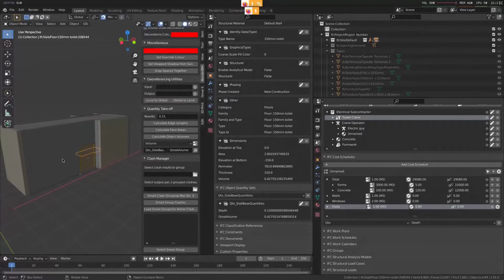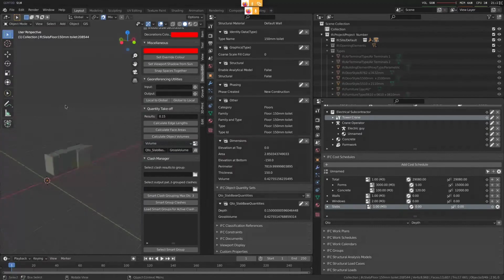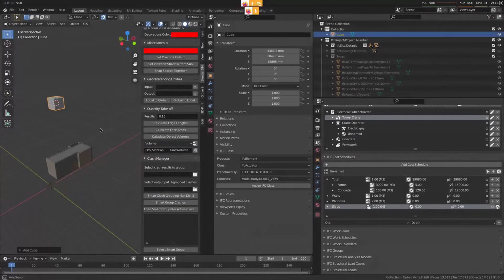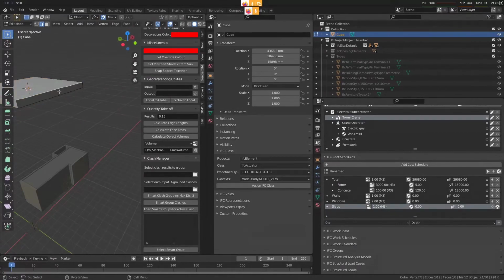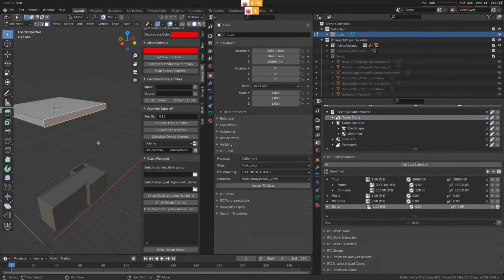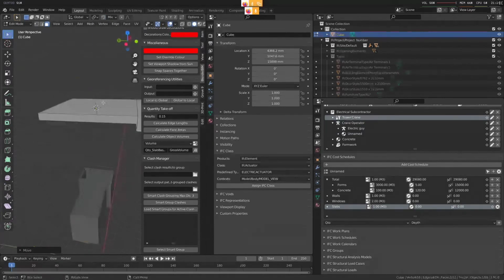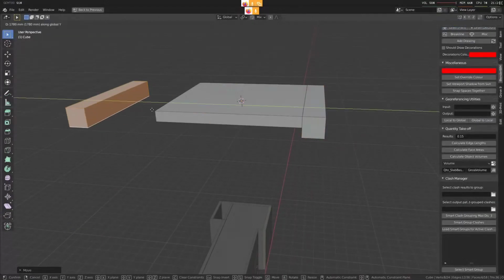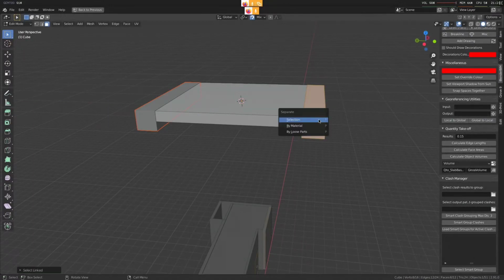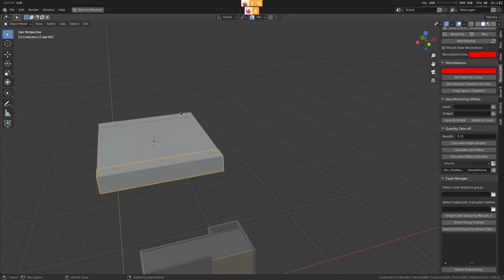And yeah, there'll also be more complex stuff. So you saw formwork there. Formwork is not a full calculation. You have to do some fancy things, and often you group many objects together. An example of where this happens is, let's say you have a thick slab, and let's say you have a beam over here. So this is how your BIM model would often come in. You'd have one object here, one object here, one object here.